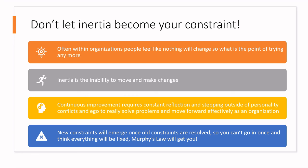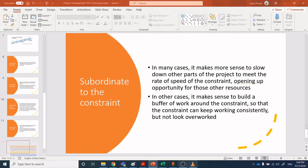Sometimes it's human factors within the system that become the constraint — personality conflicts and ego can be the issue. A big point about TOC and focusing is that new constraints always emerge as soon as old constraints are resolved. You can't do a singular TOC review, fix one constraint, and think everything will be great. As soon as you change the balance within your manufacturing system or project management, something else shifts. Murphy's Law will come and get you, so you need to reevaluate on a routine basis.